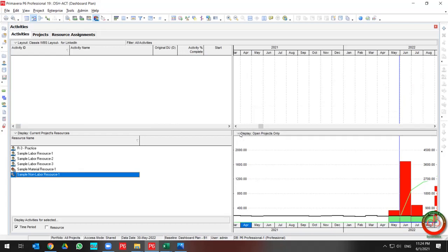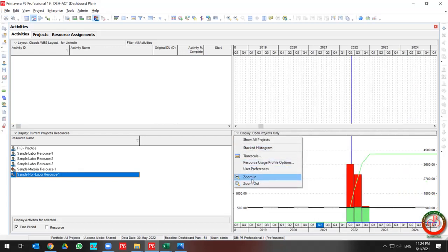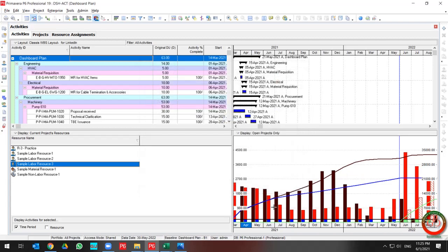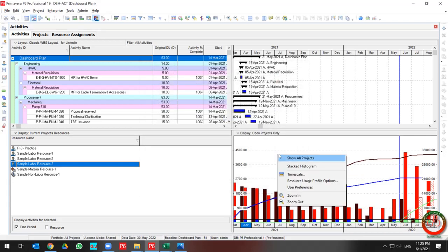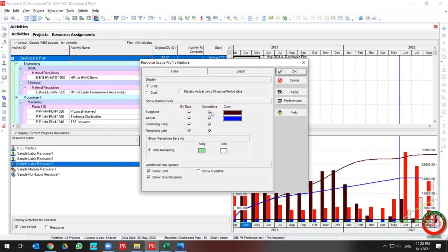If you'd like to zoom in, you can zoom in and zoom out as needed. If you want to draw a curve for Budgeted, Actual, Remaining Early, and Remaining Late and compare all of them together, right-click and go to the Resource Usage Profile options, then select all the data fields listed there.